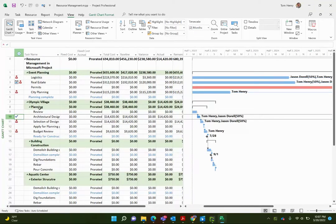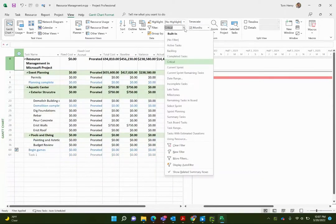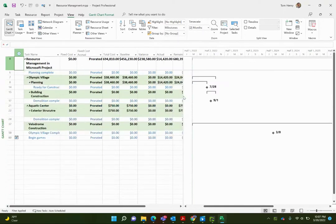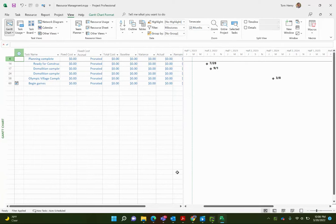If I switch back to the Gantt chart view, you'll see the task I clicked on is highlighted and it's now been marked as 100% complete on the Gantt chart. You can insert the indicators column to see that. Any view you can change very quickly and easily, adding in any column you want — it will remember that for this project. You can also filter views, for example to see just critical tasks. Critical tasks in Microsoft Project are tasks considered to have no slack — they will push out the project end date if they slip.